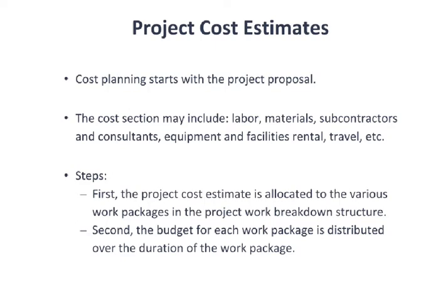So for instance, you might have a work package that is entitled Document and Publish the Results of the Research. But there might be several activities inside there: the writing of the document, the proofreading of the document, the typesetting of the document and finalization of it for publication, the mailing and shipping of the publications to the publisher. So the work package can be a little bit larger. It doesn't have to be. The work package can be at the same level as the activity. It depends upon how the budgets are performed.